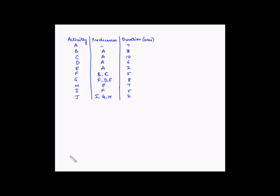Activity A does not have any predecessor, so it is not dependent on any activity before it can start. Clearly, activity A is the starting activity of this project. Let us draw the start event and give it number 1, then draw an arrow starting from event 1 and name it activity A, which takes 7 weeks.